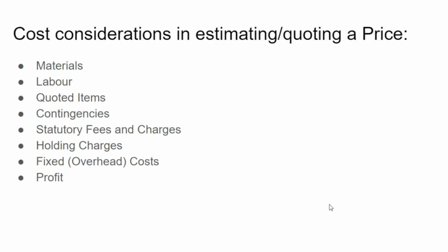So these are fixed costs, and these are costs that do not change regardless of how many you make. So you know you're going to have to charge off $1,000 a year for the lathe. If you make one product, or if you make 1,000 products, it's still going to be $1,000. So you're going to have to charge that $1,000 onto one product, or if you make 1,000 products, you're going to have to take $1 per product in order to do that.